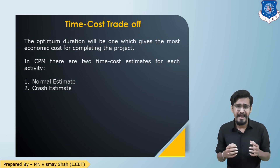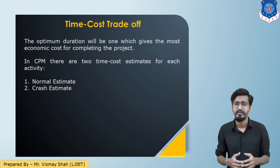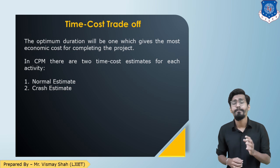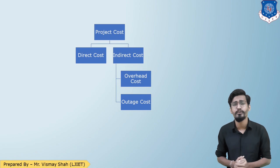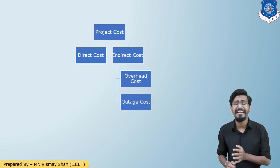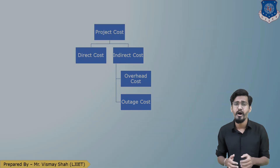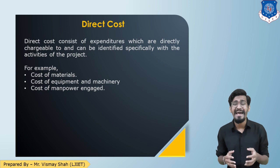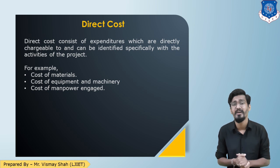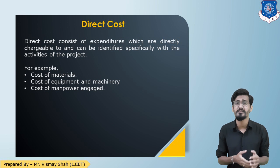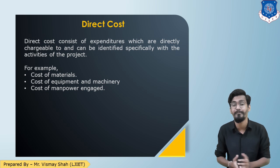Let us understand the project cost. The project cost can be divided into two types: direct cost and indirect cost. Indirect cost can be further divided into overhead charges and outage charges. The direct costs are the expenses which can be directly associated with the construction activities, such as cost of materials, cost of labor, cost of plant and machinery, etc.